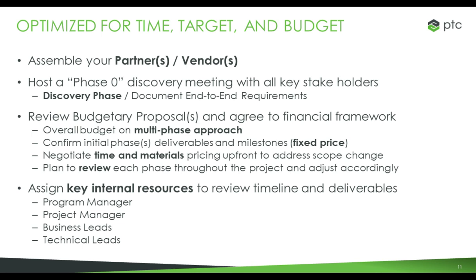So phase 1 has a budget of X, phase 2 has a budget. And then when you go out for your quotes and everything else, work within that. Very important. Typically, we'll do a high-level sort of an umbrella budget for the project based on how we see it, and then we can provide a fixed-price proposal for different phases.